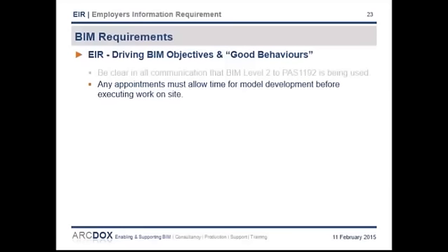To counter this traditional practice, the EIR should make it clear that any appointments must allow time for model development before executing works on site, and this equally applies to client appointments.